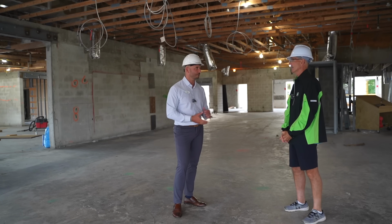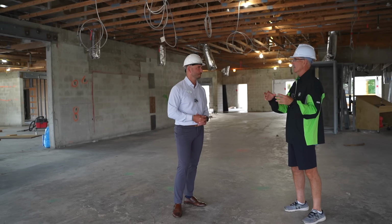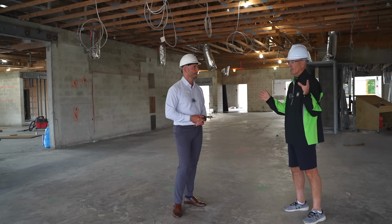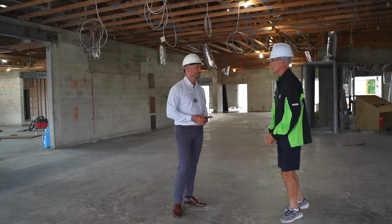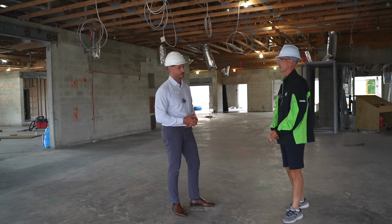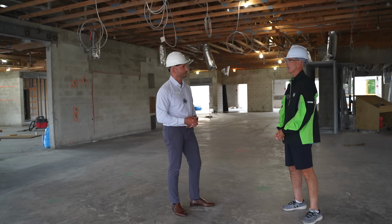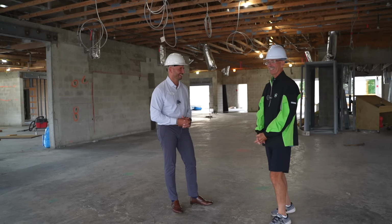Kudos to you and the committee. Well, we saw that it was a choke point. It's a normal thing where everything's coming in for the architect to review all at one time: the roof, the samples, the drawings, the doors and windows, the hardware. Everything was really starting to overload that company, and the contractor was getting a little frustrated that he didn't have all the answers he needed. So those extra meetings in the last month really cleared it out. Time well spent, for sure. Good on the committee for recognizing that and getting right on it. You guys earned your paycheck. Yes. Still waiting for that first direct deposit.